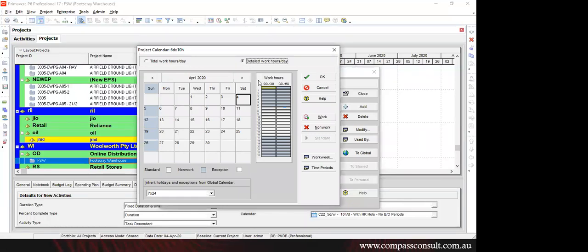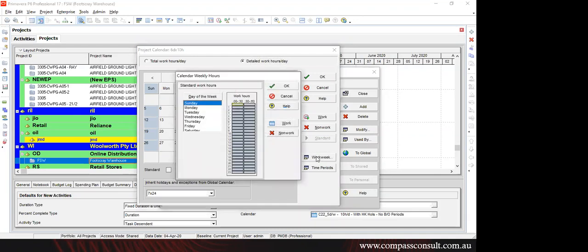Here we have the work week option again. So it's showing me the working pattern of the entire 24 hours in a single day, in 30-minute slots. We cannot make it 15 minutes or 10 minutes here, but in Microsoft Project there is an option; still it's more effective to manage it in 30-minute sessions. So we have 12 to 12:30, 12:30 to 1 o'clock, across the entire 24 hours. By default, Primavera will select the central part of that entire timing. So according to your need, we have to manage it.